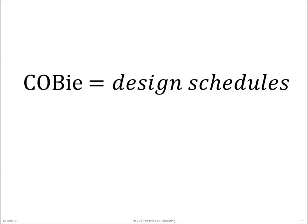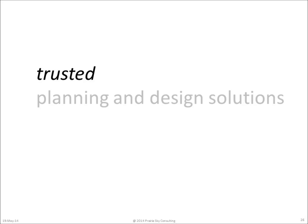In the United States, the specification of COBie simply requires that the data delivered match the information provided on the design schedules. So then the real question is,